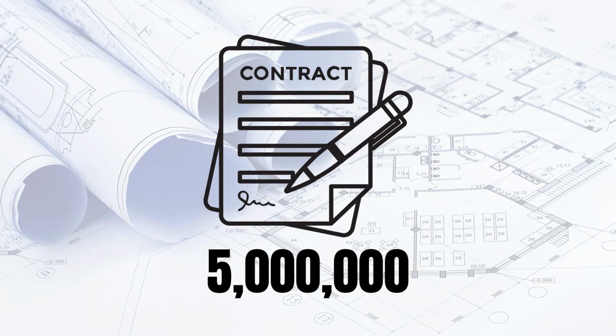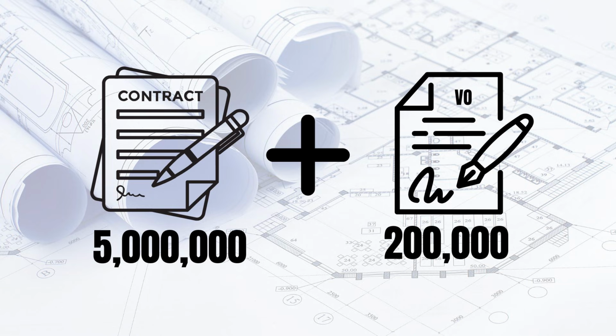And you can choose any form for that, but the meaning should be what I am telling you, that please note that there is a variation here, there is a change, and we are going to be submitting the third thing, which is called request for variation order. So basically you have a contract, and let's say your contract is 5 million. So under this contract, the client can pay you up to 5 million. But due to this change, now the client needs to pay more than 5 million. This contract has to be amended somehow. So we are requesting for something that is called variation order, which is an addition to our existing agreement or existing contract. And in some of the cases, we go to make a contract amendment.